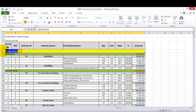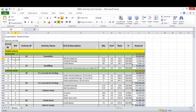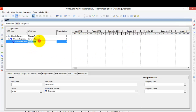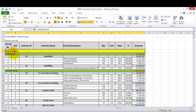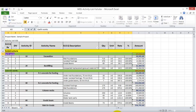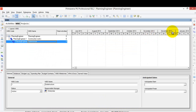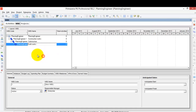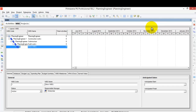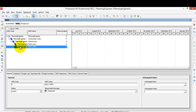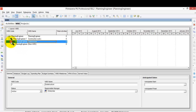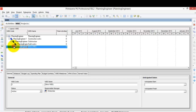Under the Construction work, I'll start adding levels. The first item is 'Substructure.' I'll copy the name from my Excel sheet, go to Primavera, add a new level, and call it 'Substructure.' Under Substructure, I'll add 'Earthwork.' Then I'll add another level but adjust its hierarchy using the indent/outdent arrows to place it at the same level as Substructure.